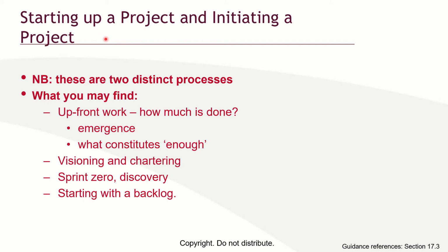The workers have not moved to site. At starting up a project, you are still finalizing what stages you are going to have, what the features are. The customer is still prioritizing. That is what starting up a project and initiating a project is all about. You're identifying what resources you need, who are the people that will carry out the work. That's what that implies. Okay.